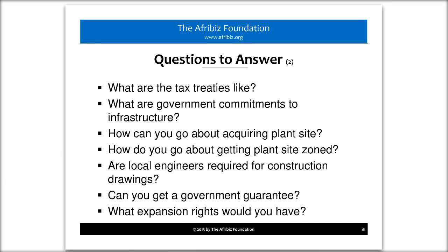And even, for example, if they're saying they're going to pay for it, they might have identified where the logical places are where they can connect power to the grid. And so you might want to try and see if you can find your site around there, because by having that knowledge, you've already sped up the likelihood that you can get an interconnection agreement.